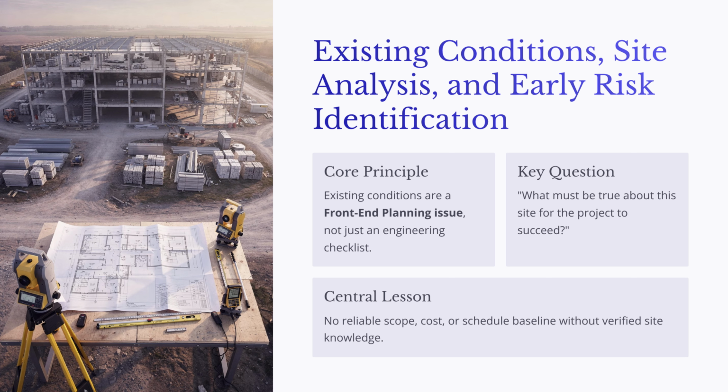That is why existing conditions should not be treated as a simple engineering checklist. They are a front-end planning issue. They can determine whether the selected project concept is actually feasible, affordable, buildable, and practical to operate. The key question during front-end planning is not only what do we want to build? A better question is, what must be true about this site for the project to succeed?